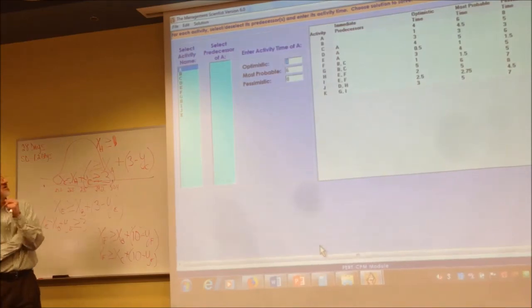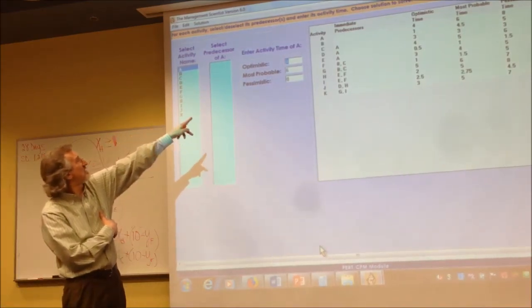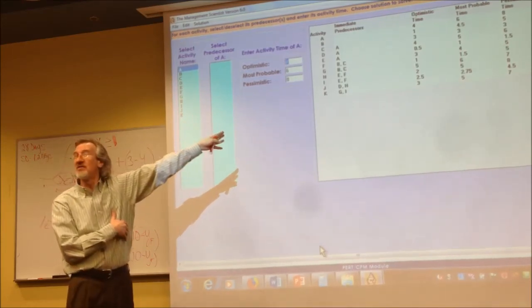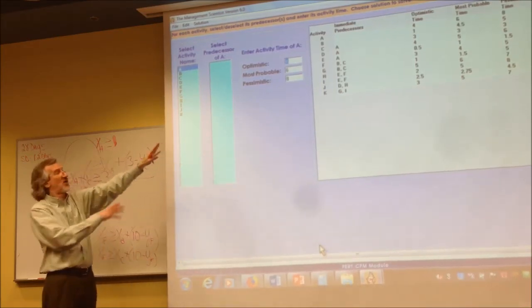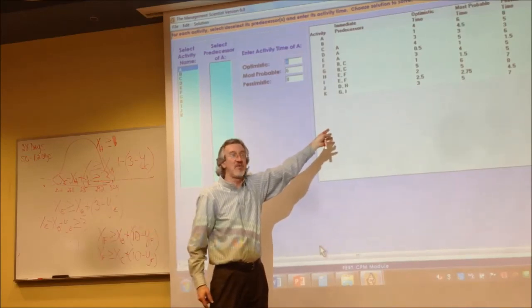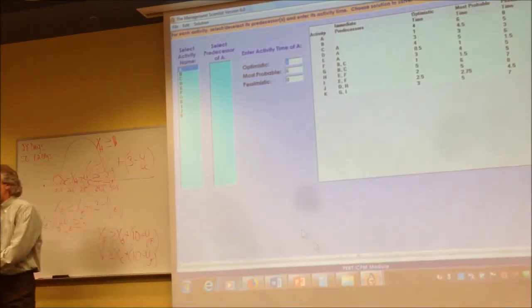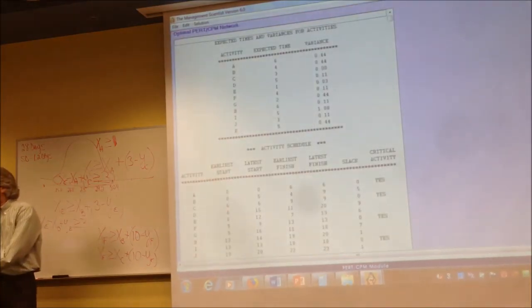And wow, you got fast. C is preceded by A with 3, 3, 3. D is preceded by A with 4, 5, 6. E, and so on. See how I did? This is how you enter it all. You've got it all set up. It looks just like that page on the PowerPoint, right? With what precedes it and what the times are. Then you hit solution.